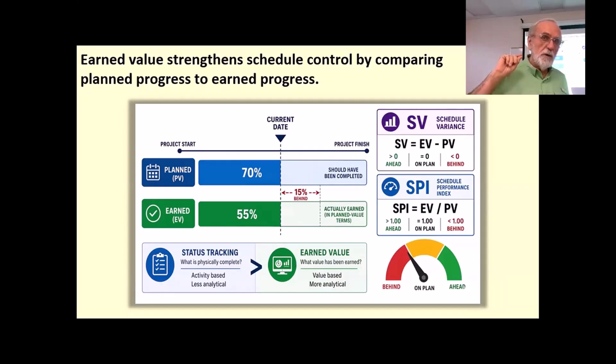You can say, well, okay, for all the work that's remaining, if we apply that 90%, what does that do to our end date? You can just calculate that forward and calculate a new end date. And that can give you some insight into what's going on. So you can assume that everything's normal.